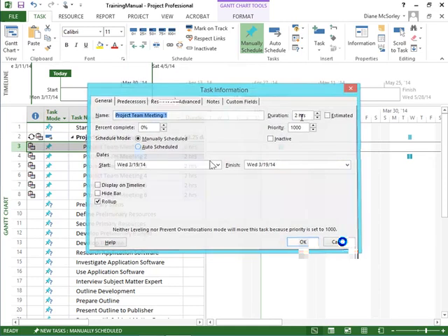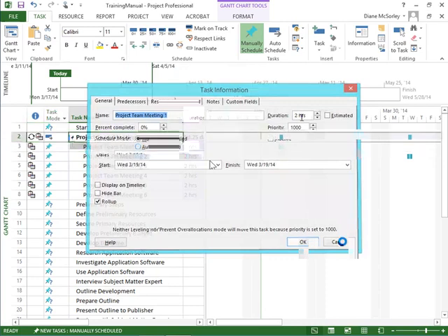Also very nicely, next to the project team meeting, we have a little twisty. I can give a little click to that triangle. It'll twist and collapse them into a single line. Little indicator to the left lets me know it's a recurring task. Never, never, never type a task in more than once. Use this.